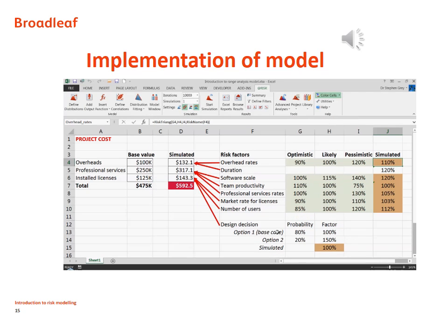The design decision variable, that's only going to take on one of two values. Either the costs will be as assumed, so the factor is 100%, or the costs will be 50% higher. And you'll see that if I press the F9 key, these variables all move, and the continuous variables, the 6 on the right, take on a value somewhere in the range between their optimistic and pessimistic value, and they tend to fall near their most likely value.